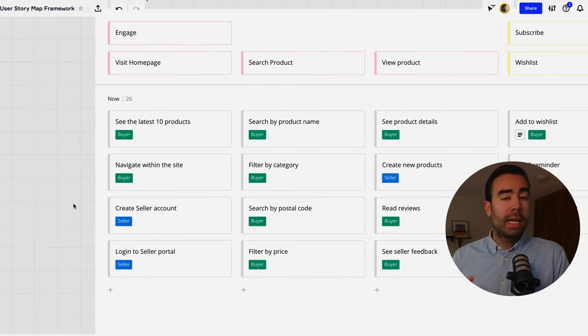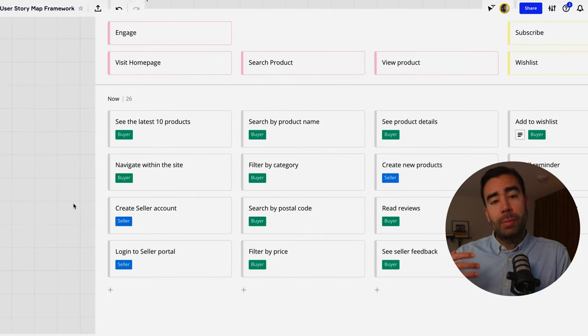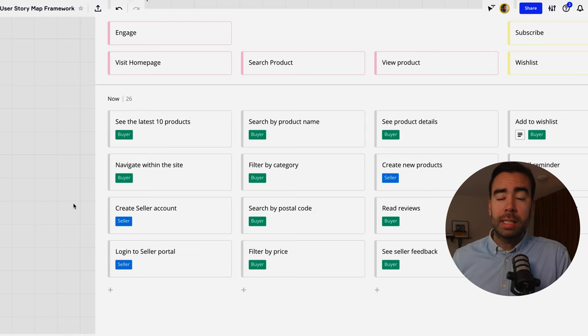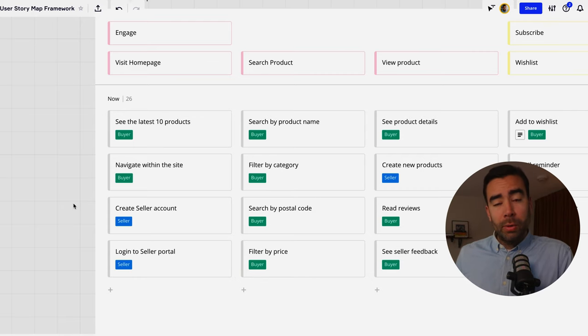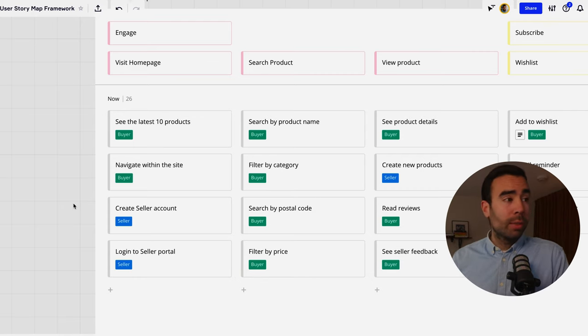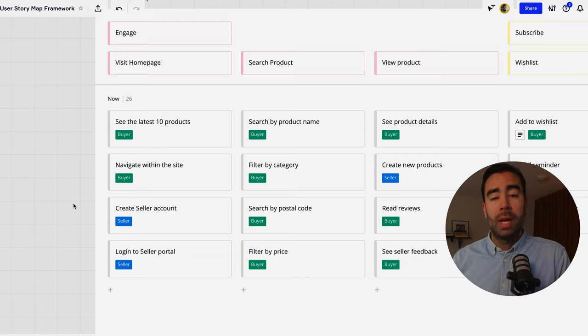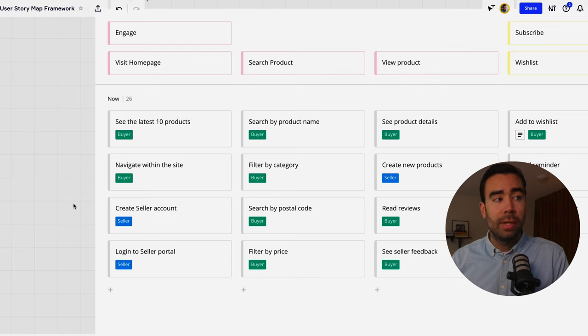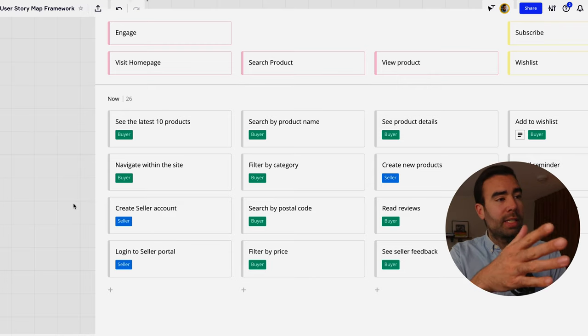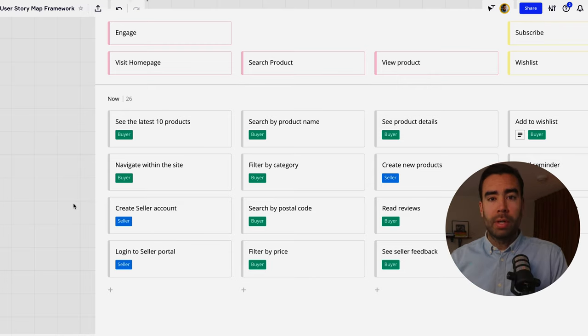When doing this step it's always important to decide on what gives the most value to your customer and requires the least effort of your team while still making sense as a product. A great way to do this with your team in 15 minutes is called magic estimation I will talk more about that in a future video for now let's slice out the strategy for this online marketplace.